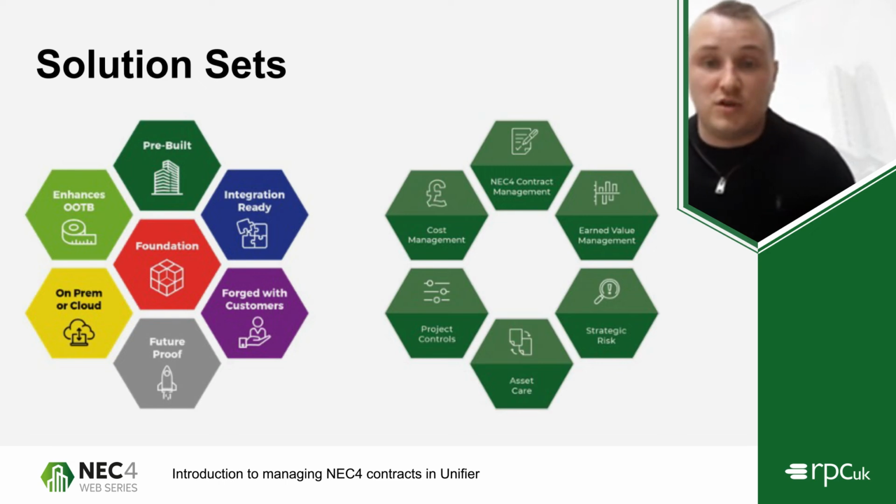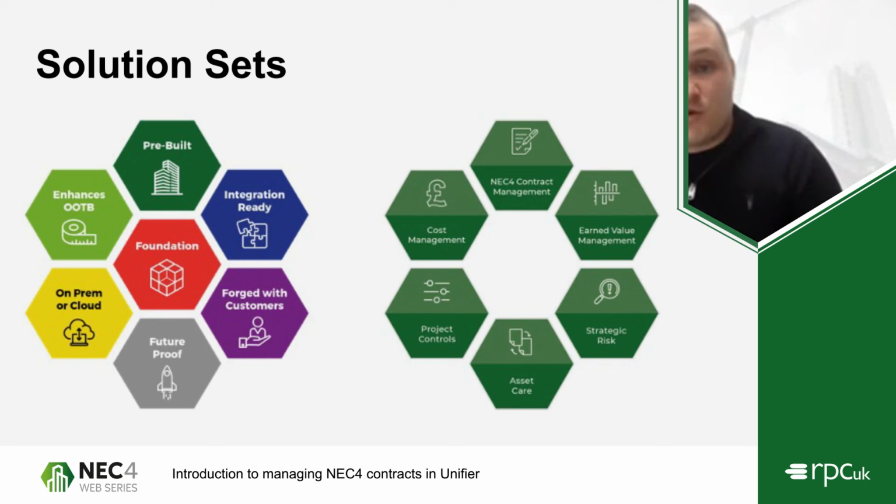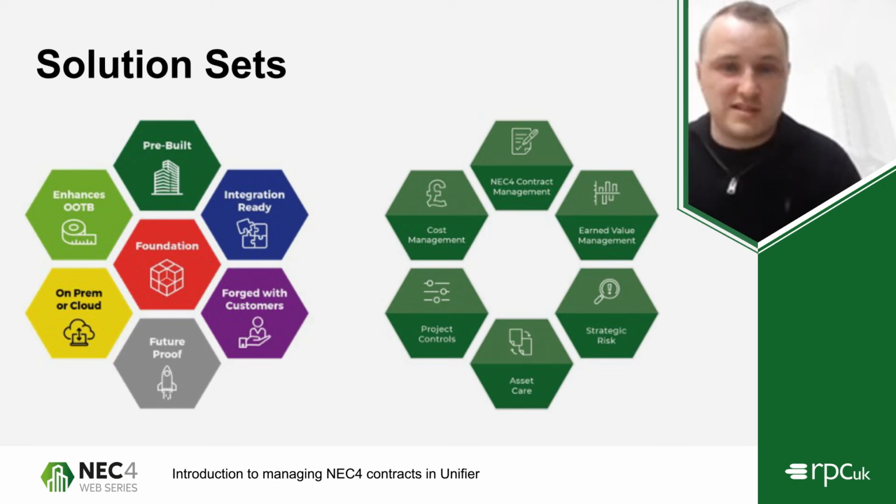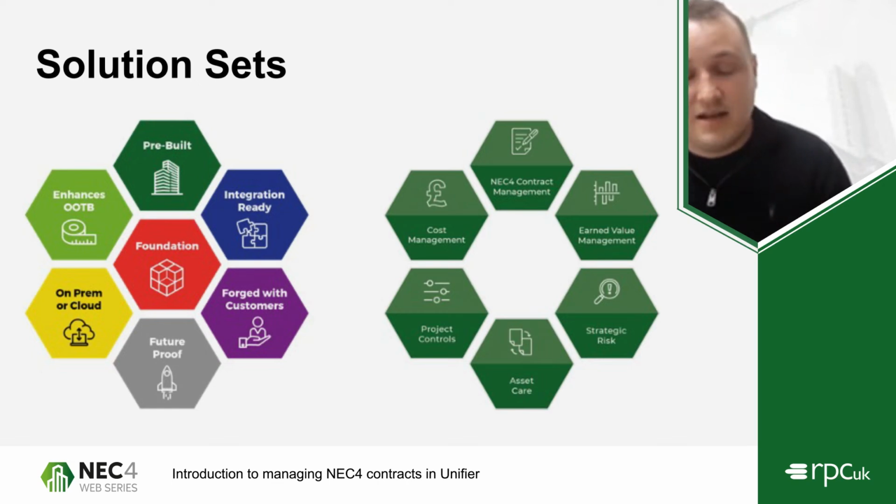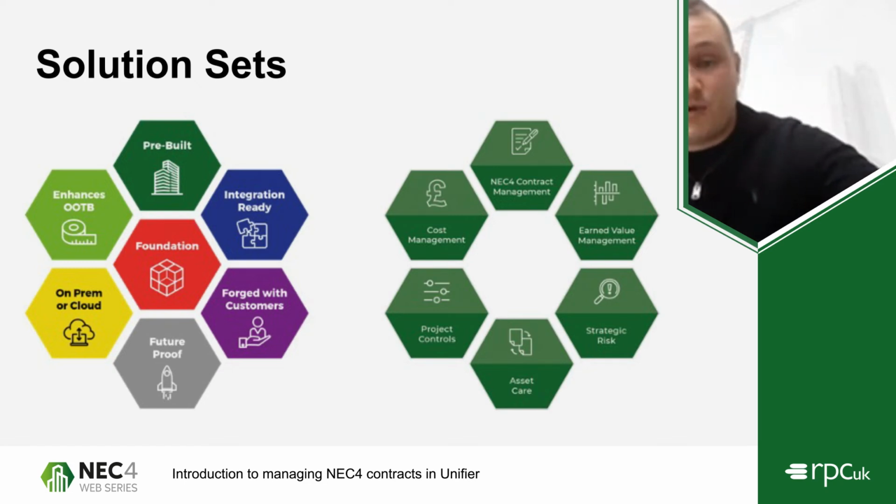So what we were able to do is, within Unifier, we configured a solution set that contained all the NEC workflows. So early warnings, compensation events, instructions. All those processes that you would use to manage an NEC. But now the beauty of what the solution set does is that it will automatically feed in to their existing cost management functionality at a project level.